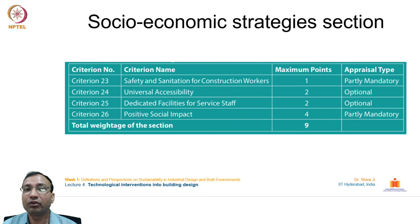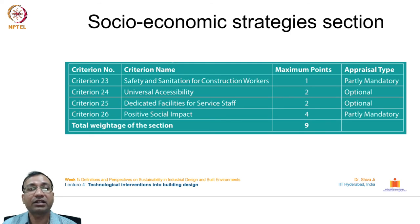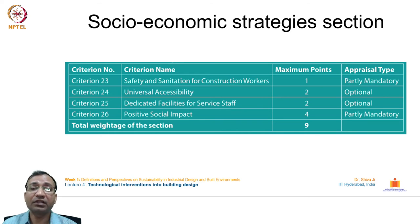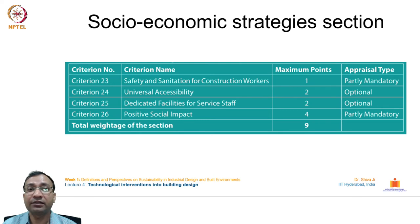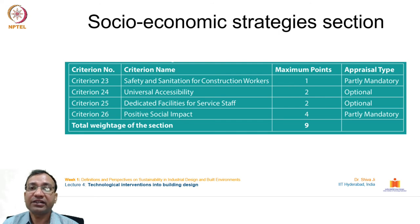The socio-economic strategies section has four criteria: safety and sanitation for construction workers (1 point), universal accessibility (2 points), dedicated facilities for service staff (2 points), and positive social impact (4 points). Construction workers have historically lived in poor conditions without potable water or sanitation. Recent developments require taking care of the workforce, ensuring basic necessities including water, sanitation, and living facilities for workers and their families.